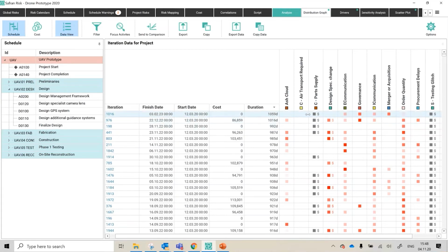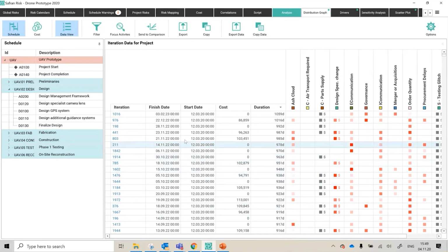I can see also, as I scroll down and I look, which risks fired or tend to fire during worst case scenarios. So this gives me some indication as to what might be typically at play in a bad day at the office. It can lead to more questions like, how do I make these particular combinations of risks not occur at the same time? You know, talking about that complexity theory, again, how do you decouple things, remove their kind of cascade or domino effect between one another? So it opens up new avenues of investigation.